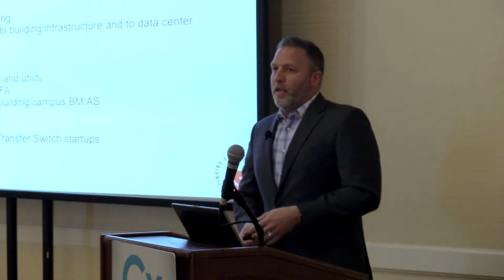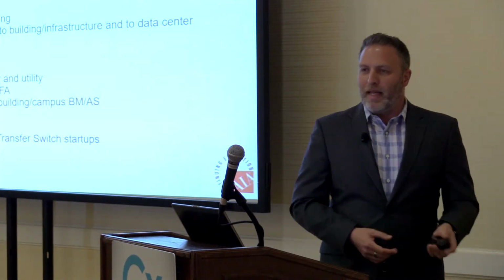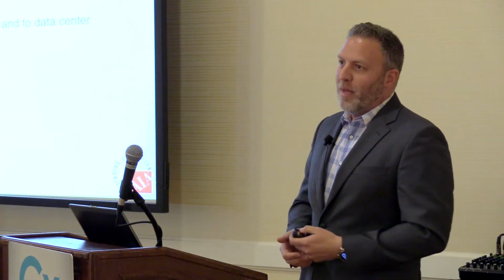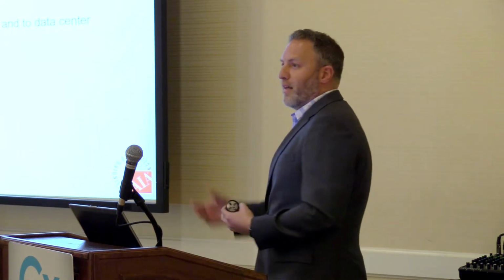Now's the time where you're also looking at doing your final vendor checks. What I mean by that is you tested your power module with a UPS, but there weren't any batteries there. Those batteries are heavy, they have a shelf life, they need to be fully charged. So they're going to get delivered to the site after the power module is installed. There's going to be an installation period of a couple weeks. Then you're going to start doing some site acceptance, startup tests with those.